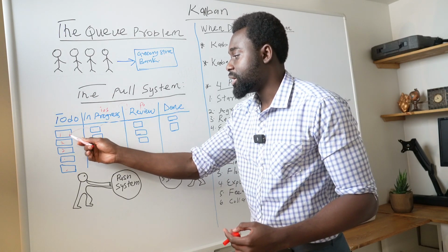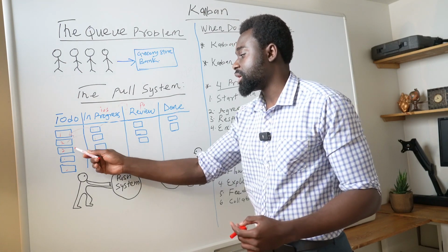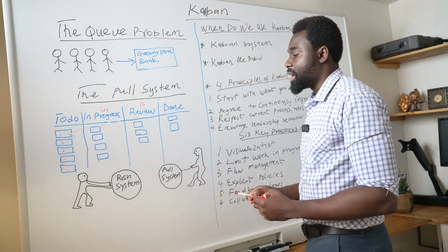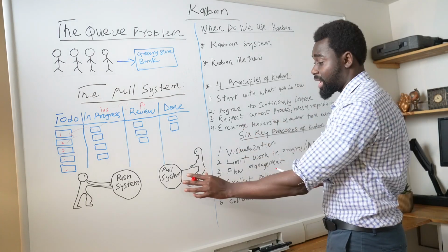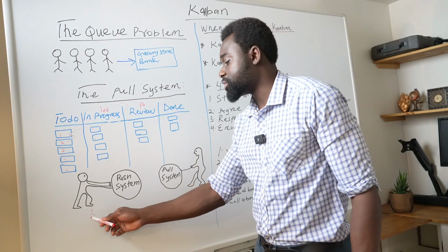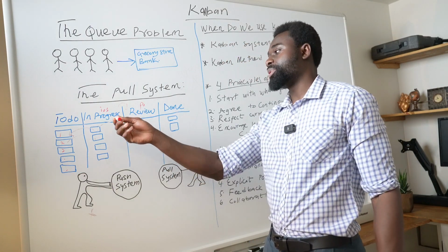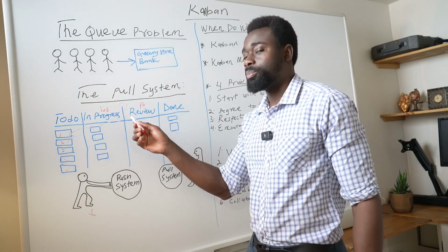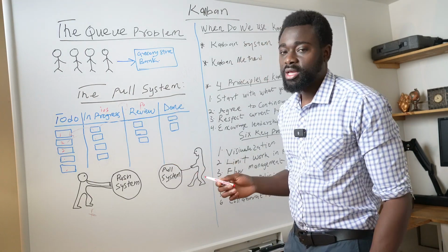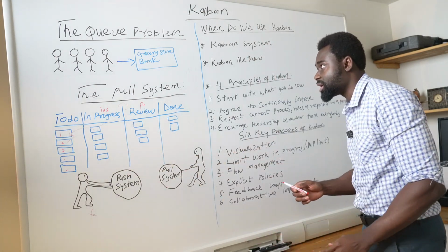So number 1, he will pull work item 1, pull work item 2, 3, and 4 to be worked on. And that's how the Kanban approach or the pull system arises. And we're trying to avoid the push system where managers or colleagues keep pushing work to people to do, rather than allowing developers or individuals to pull their work to be worked on by themselves.